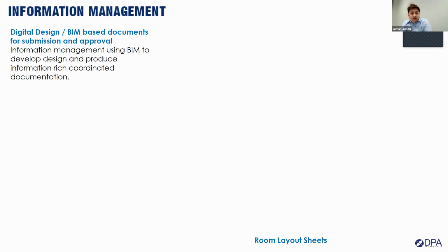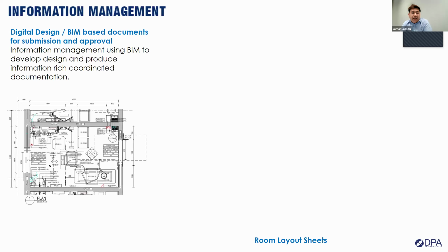How do we do the information management? Information management using BIM to develop, design, and produce rich coordinated documentation. As you can see on the screen is a sample of a room that contains all the elements that are required to be modeled and documented in a healthcare project. Every equipment, every M&E point, fixtures, furniture, and major equipment are to be modeled and tagged with a proper coding system and description.